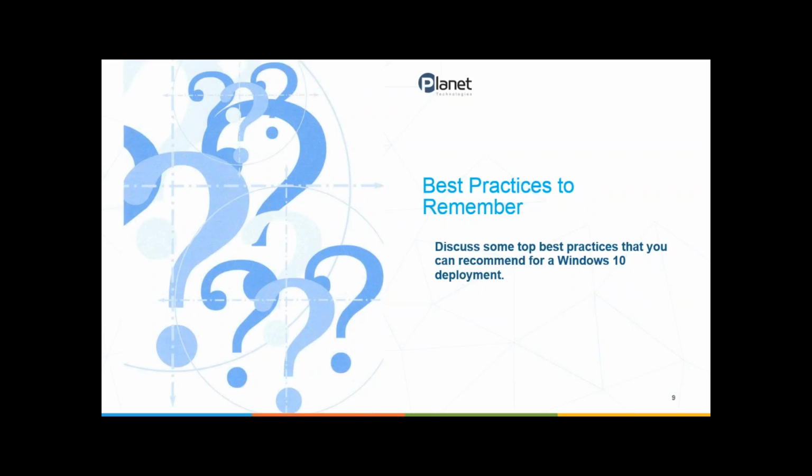So again, it sounds like don't introduce too much in your environment. Don't make too many changes at one time. So if you're working on going from Windows 7 to Windows 10, do that first. And then, hey, by the way, we're going to move to Office 365 too, as a project that comes in after the fact, when it's possible. It's less about the technical aspects of actually performing the upgrade, but more from end user adoption and ensuring that you're not throwing too much at them at once.